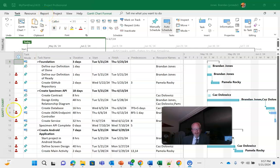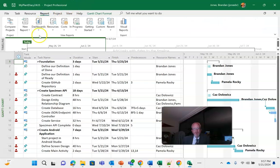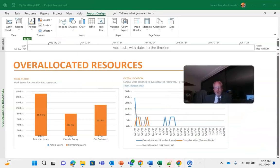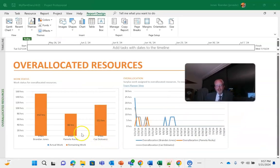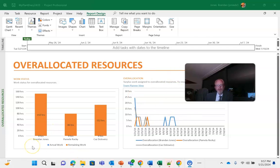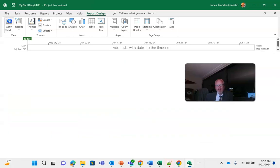Now first of all, let's see who is over-allocated. We can see the indications here but we can also go to a report on resources and say over-allocated resources and we can see hours per resource. And then we can also see the over-allocation is time passes so we can get an idea of when within our calendar this resource is over-allocated.